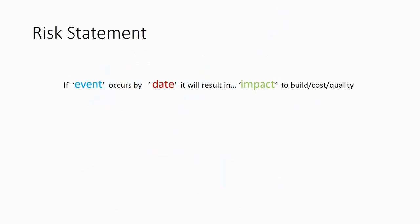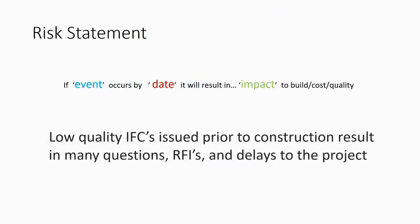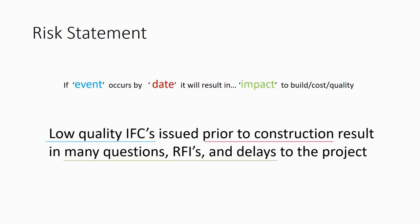Let me give you an example of a risk statement. Low quality IFCs issued prior to construction result in many questions, RFIs, and delays to the project.